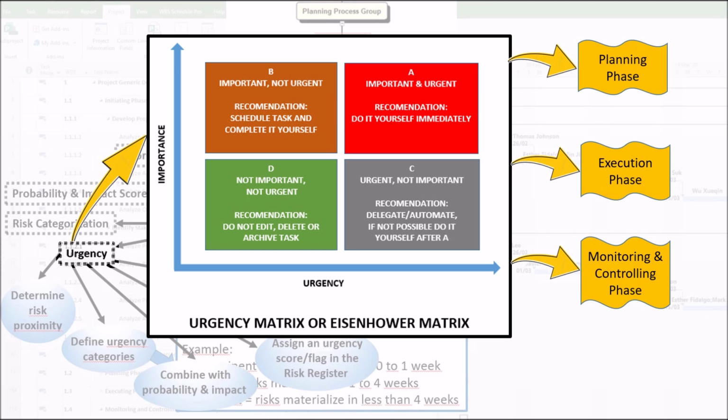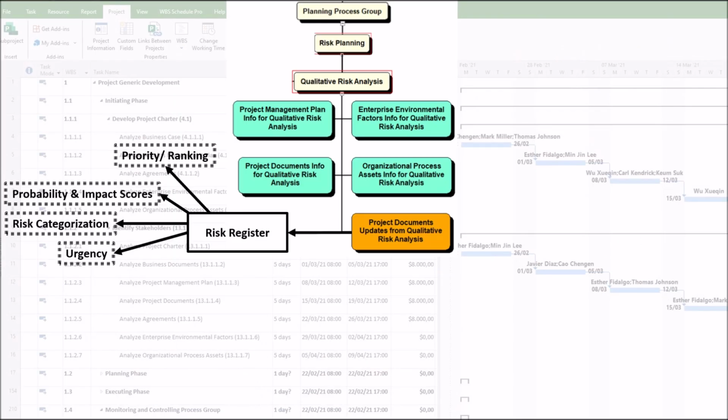After this pause to explain how the urgency assessment is implemented, let's return to our studies. Returning to the components of the risk register that are updated during the qualitative analysis, the next components are: the fifth component is risk proximity. It is a more specific timeline, such as within the first 2 sprints, or during user acceptance test phase. It is based on actionable planning. Allows you to schedule risk response actions on the project calendar.